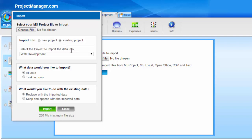You can choose to import all the data or simply a task list and then either replace the data that's in your project with the imported data or keep and append both sets of data. That's of course if you were in an existing project and you could simply import.